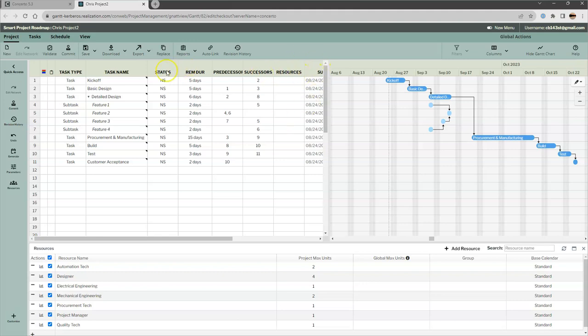There may be some activities that don't require Tier 2, but most, I would say, if we do this correctly, we create this network at a fairly high level, not too many Tier 1 tasks. Think about how to bucketize them for release and execution to focus our resource capacity on those Tier 1 groupings. Then most of my Tier 1s will have a number of Tier 2s. So at the Tier 2 level, I will assign resources.